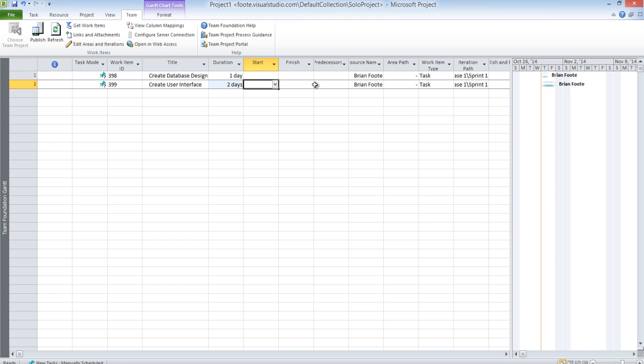What I'd like to do is I would like task 2 to be after task 1, so I can't do number 2 until I do number 1. Not terribly true here, but you can guess there's things that'll happen like that. So what I'm going to do is tweak the predecessor field. So I'm going to say number 2 cannot happen until number 1 happens.